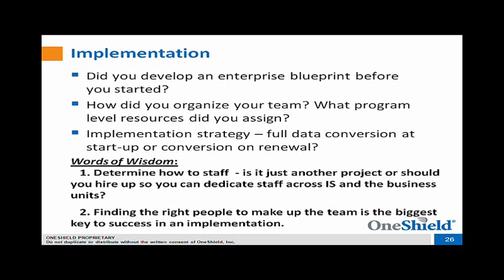From that, you should expect that this is just a candidate, it's an ideal, it's not what you're going to implement. So as you go forward, you'll still develop your software architecture documents to match what you're implementing. You can always go back to your candidate architecture, your blueprint, to compare it, to know where am I deviating? Is it important that I'm deviating? And what does that mean? So it is quite important to have that blueprint before you start.